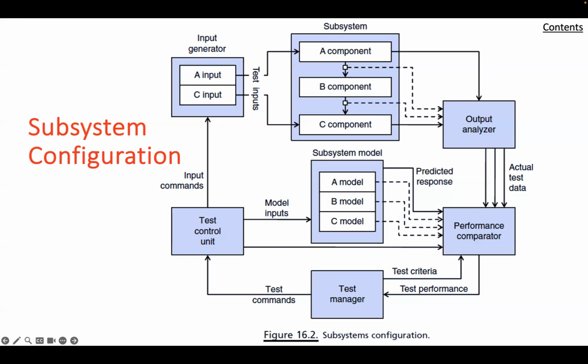And so the order in which system components are integrated should be selected to avoid the need to construct special input generators for simulating components within the subsystem, that is, other than those simulating inputs from sources external to the subsystem being integrated. Thus, at any point in the assembly, the component that is to be added should have inputs that are derivable either from generators of external inputs or the output of the components previously assembled.